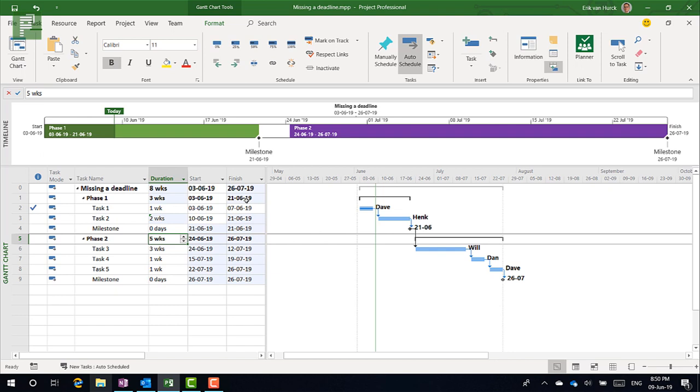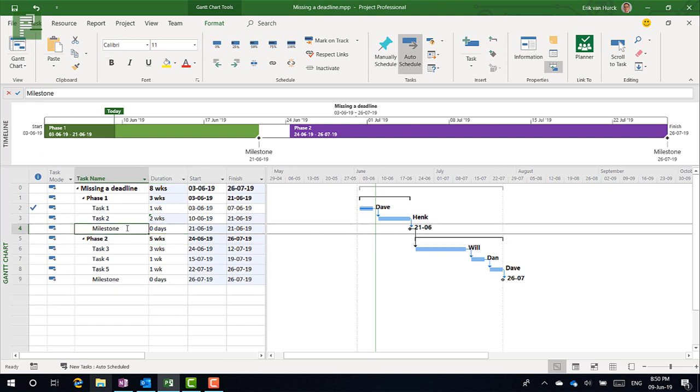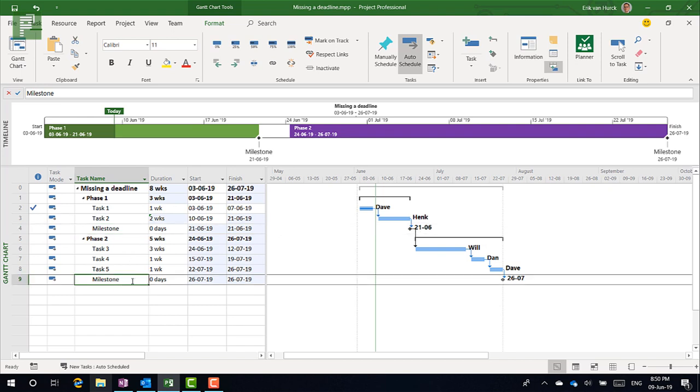Most of the time a deadline is a fixed value that you get from an external source - for instance your assignment owner, the contract giver, or the client that gives you that set deadline. That can, but not always, is the same as your last milestone. So for instance, this milestone we're going to be all right - there is going to be a deadline that we don't skip. And on the end we'll have a deadline that we do surpass, and what happens in Microsoft Project when that happens.